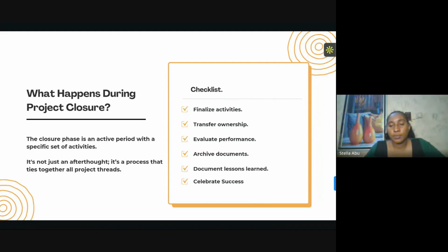Okay, basically it's just breaking down your tasks from that idea of this is what I want to do. You're breaking it down to smallest activities, right? I remember we discussed it in details where we have different phases and breaking it down. For example, say we want to build a mobile app. That's a whole lot of things to say. What are the activities for you to be able to build it?